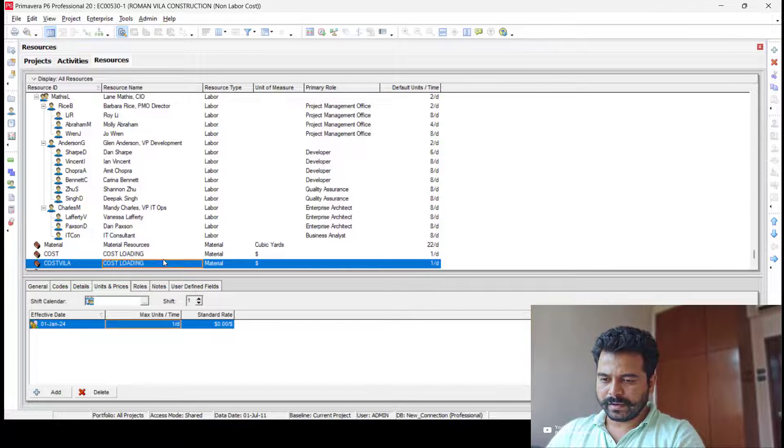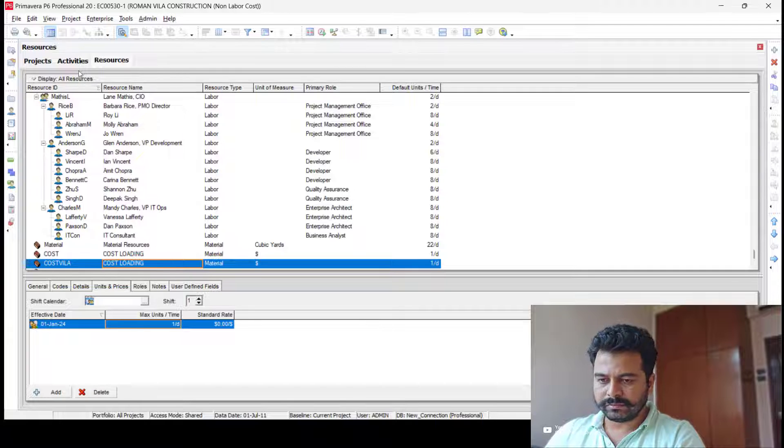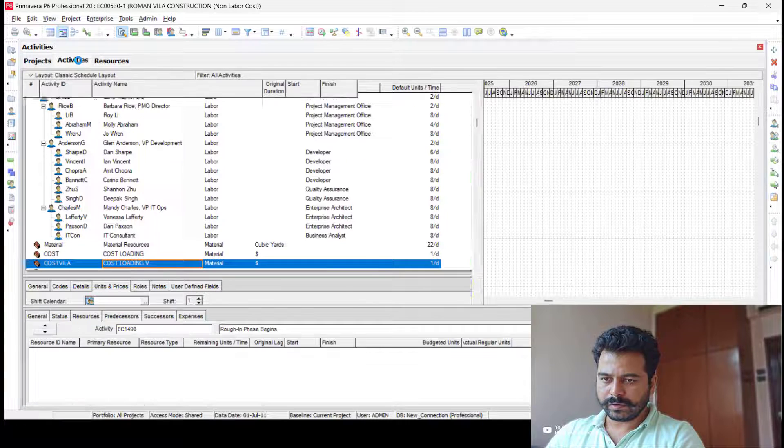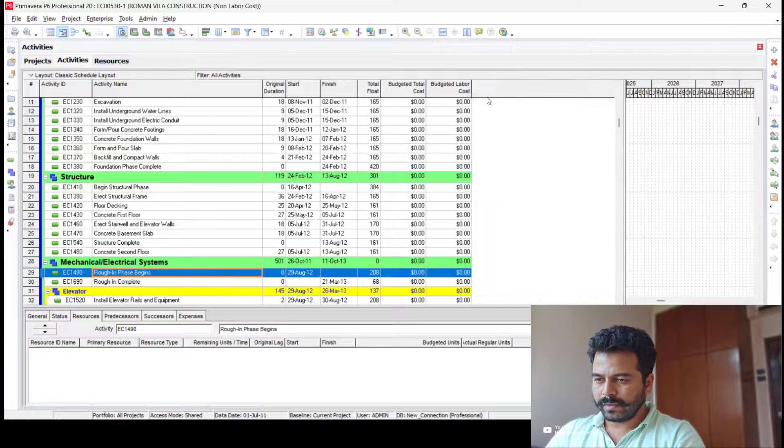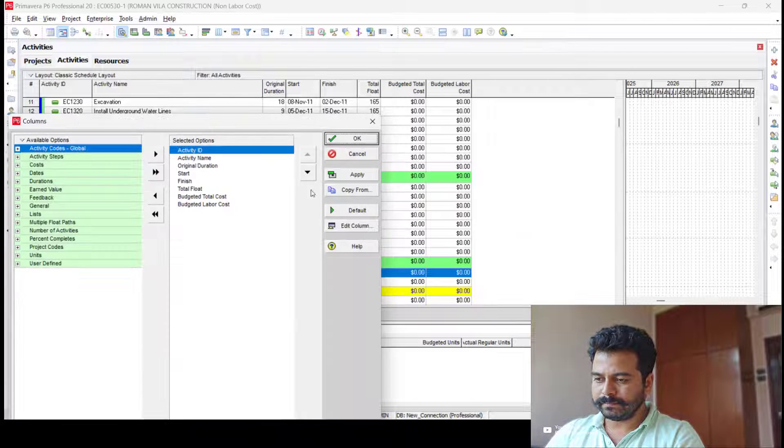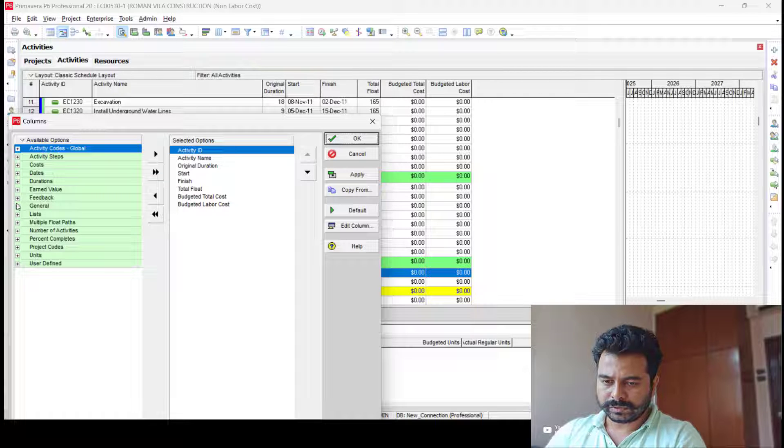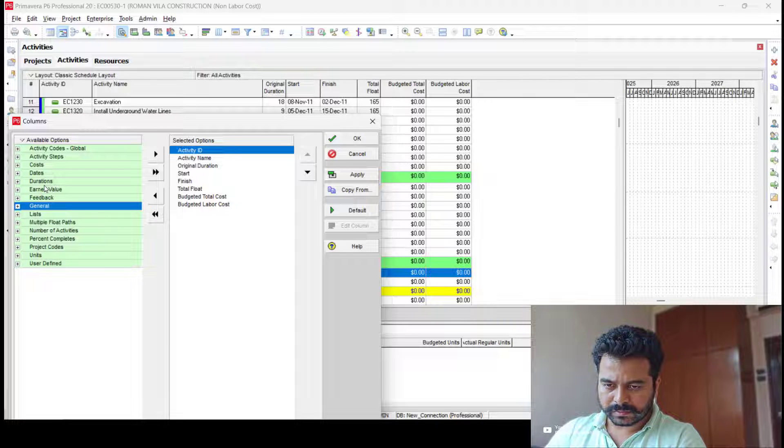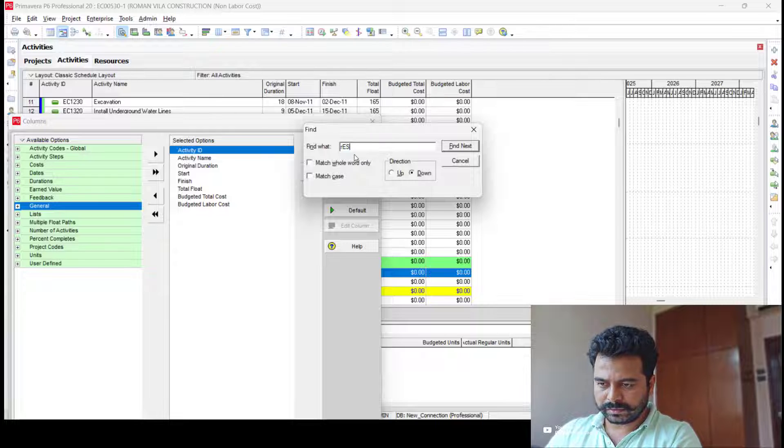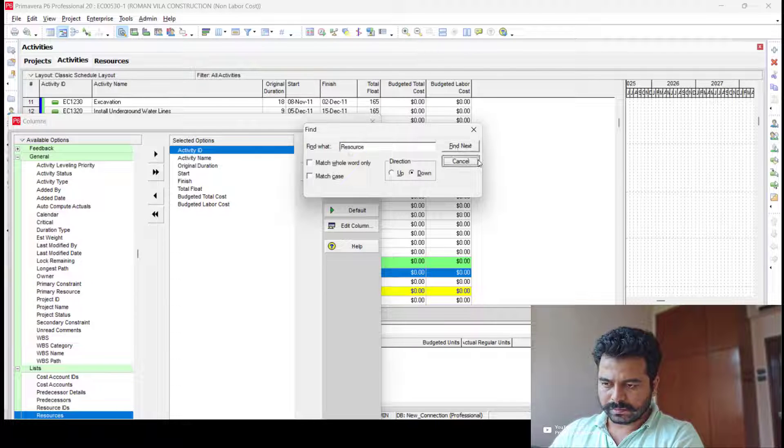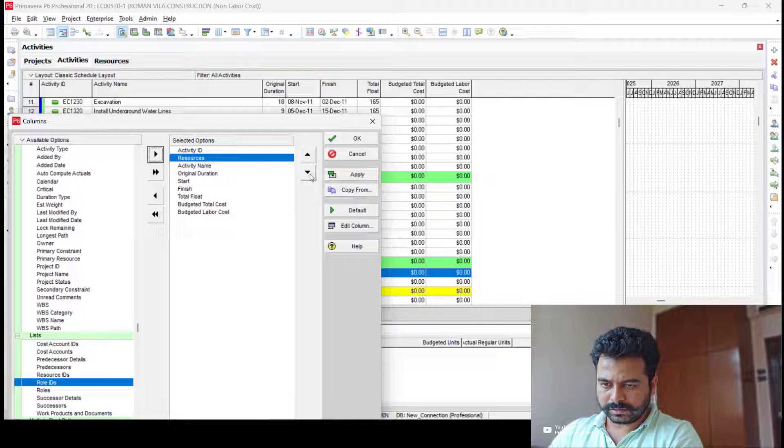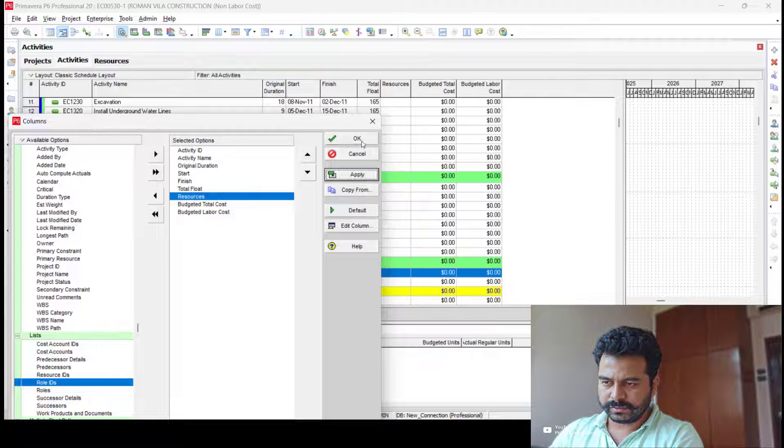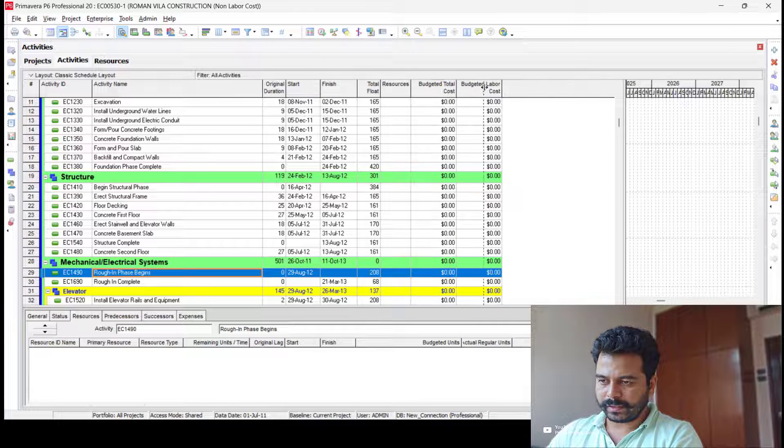Okay, the resource is created. Now let me go back to the Cost Loading project, go to the Activity tab, and add a column. Select Resources under General. Use Ctrl+F to find the resources. Under list, select Resources and place it here. So the resource column is here.